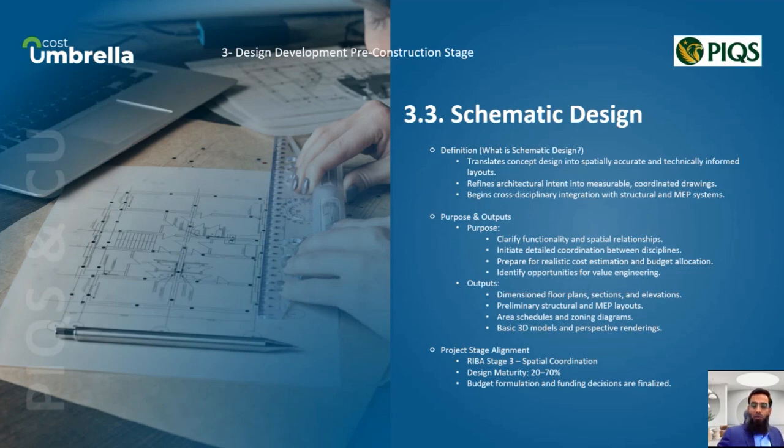At this stage, value engineering potential ideas are located and implemented at detailed design stage. Design maturity level at this stage is 20 to 70%. At this stage, realistic budget is prepared and project funds are secured.